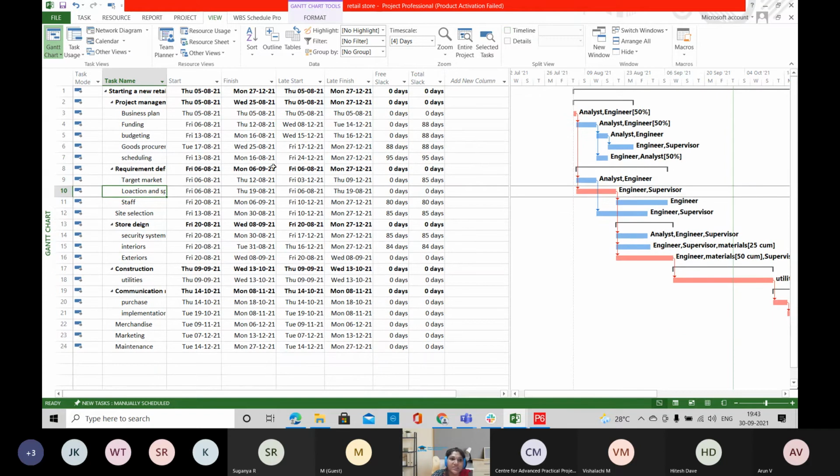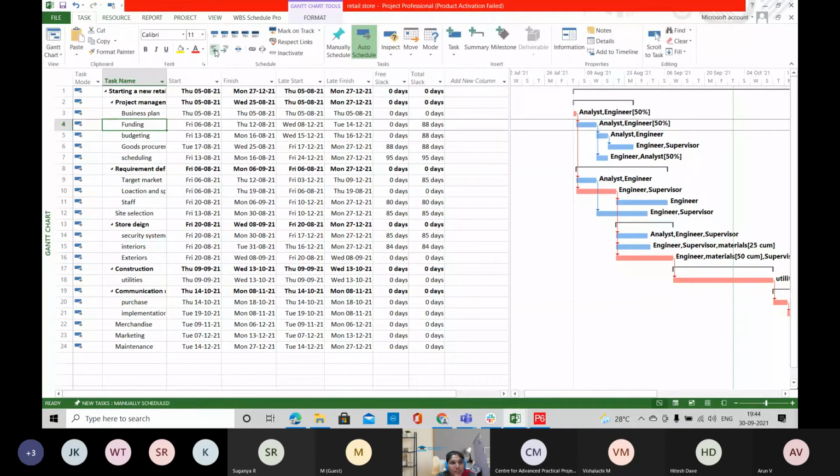And then you will have the work breakdown structure. Work breakdown structure is dividing your project into a few, more manageable deliverables. For each and every deliverable, you can include activities. Here in Microsoft Project, you can do it with the help of the indent and outdent buttons. You can select the activities to be indented or outdented according to the project requirement, and the work breakdown structure will be formed here.